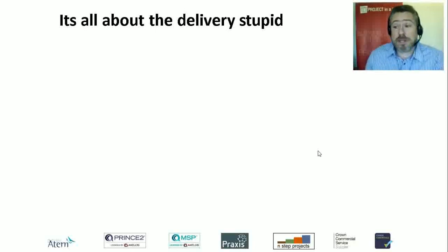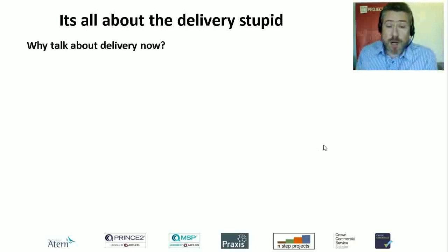We're producing something for the customer to their satisfaction, which is going to be the deliverable of the project. There may, of course, be multiple deliverables, and that's why we're talking about delivery now. It's quite common to deliver part of the project, get it signed off, then deliver the next bit, get it signed off, etc. You're building those blocks, rather than sometimes just delivering one thing that gets signed off in one go, in which case, of course, it's going to be at the end. But often that's not the case, and often stages are broken up into cycles where you do something and then go back and do the next bit again.